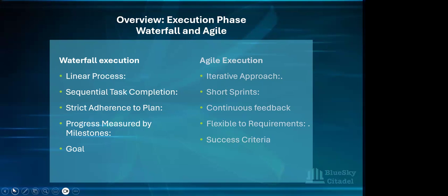And that is what the Scrum guide says. You don't want anything longer than 4 weeks, because technically after 4 weeks it's not really going to be really kind of short. Even 4 weeks is actually quite long if you think about it in terms of following that iterative approach. So like I mentioned, your sprints will typically be between 1 to 4 weeks.